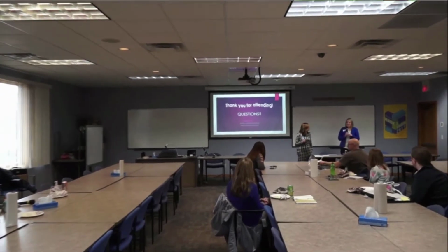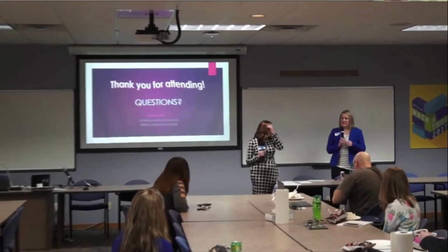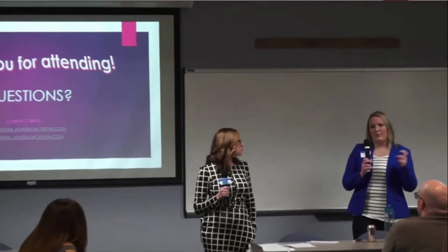And with some of the projects that are utilizing the test strategy document, they're actually getting approval of it in some capacity. So up front, we can say going into it, maybe our gut check is that we're going to do all highs and all mediums and most likely de-scope lows. And that's in that document and approved by the project team up front. And then again, if that changes and we have time, we can always adjust it.